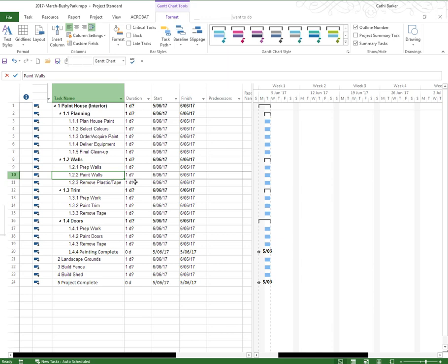In fact, let's come back to the concept of the template. When we created the template or saved the file as a template, it was saving the public holidays, it was saving the calendar settings. So maybe also in your template, any generic tasks that are always involved in a maintenance contract, add them to the template, save them with the template. And also maybe the outline numbering, perhaps that should be part of the template, or maybe the WBS column should be part of the template. So think about things like that.